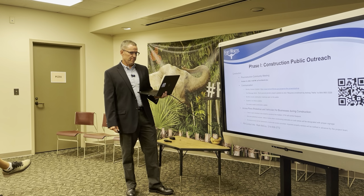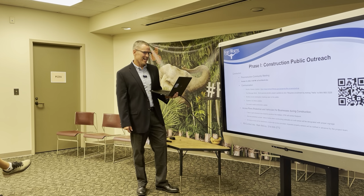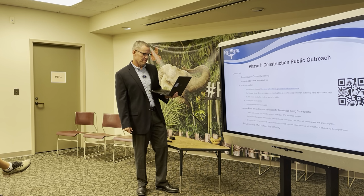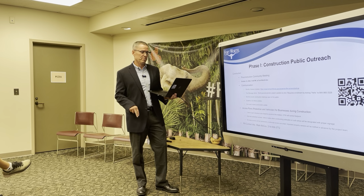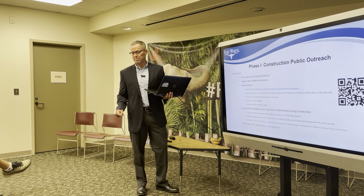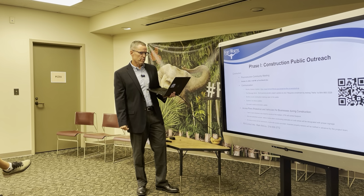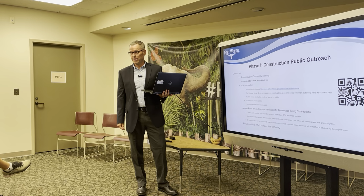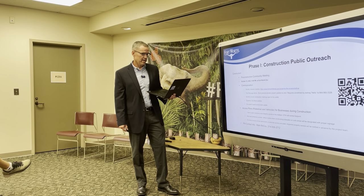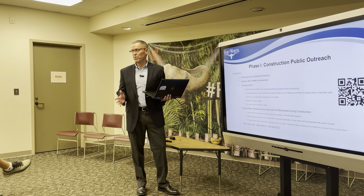Talking about access plans for pedestrians and vehicles, particularly for businesses like Eatsies during construction. In the contract, there are restrictions on the number of lanes that can be closed at certain times. In particular, one lane will have to be closed in each direction to build a new median, obviously, because it's right in the middle of the street. But we will keep the construction to one section of median at a time, so the entire stretch isn't closed at once. When we're building the sidewalks, there will be accessible alternate routes for pedestrians, and we'll make sure those are signed properly and that there's advance notice given. Driveway access will be maintained, or we'll give you alternate access so there's always a way to get where you're trying to go.